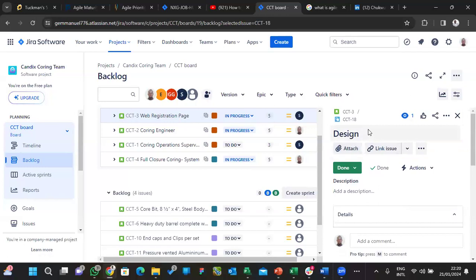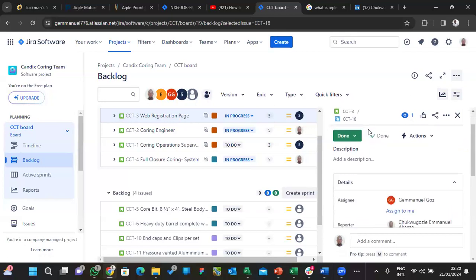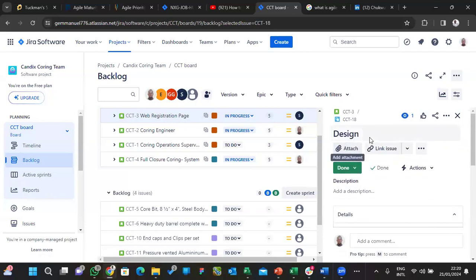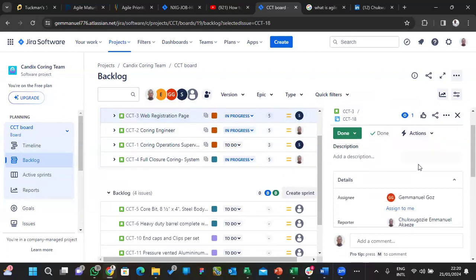Remember, this is one sprint we are talking about. Of course, you are on a 2 week sprint, so you need to ensure that everything you plan here will fall within 2 weeks. Nobody is going to have work that will exceed 2 weeks, right?